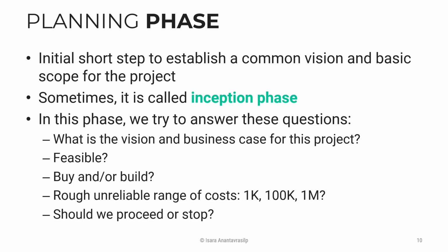Experienced developers can usually estimate something like, well, I think compared to the other projects that I have done, they are about the same size, and I have done that for about 2 million baht. So I would say 2 million, yeah, plus minus. Or maybe it's 500K, maybe it's 1K, right? But usually people can do that. And if it is way over budget, then maybe it's not feasible. Maybe it's not for you. Or maybe you need to invest more. You need to find other investors.